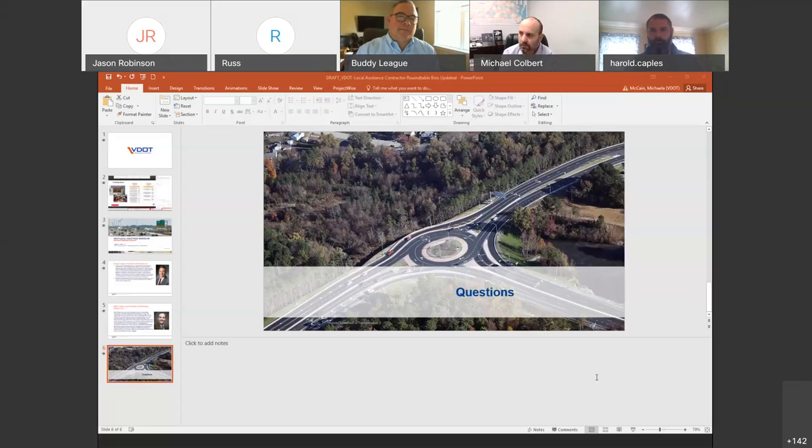Mike, you're the estimating expert. What are your thoughts? Well, thanks for that plug. It's commonsensical a little bit: the more complex the change is, the more time we need. As Buddy mentioned earlier, we go full bore and do quantity takeoffs on all the scope of the project. So if there's a major plan change where we essentially have to start over, it may be an extreme challenge, for example on a large earthwork project, to go back and start from scratch because the sequencing changed or you reissued the plan set. So a lot of that plays into it. I agree with what Buddy said. I like the VDOT system. That's typically enough time to deal with the majority of changes.